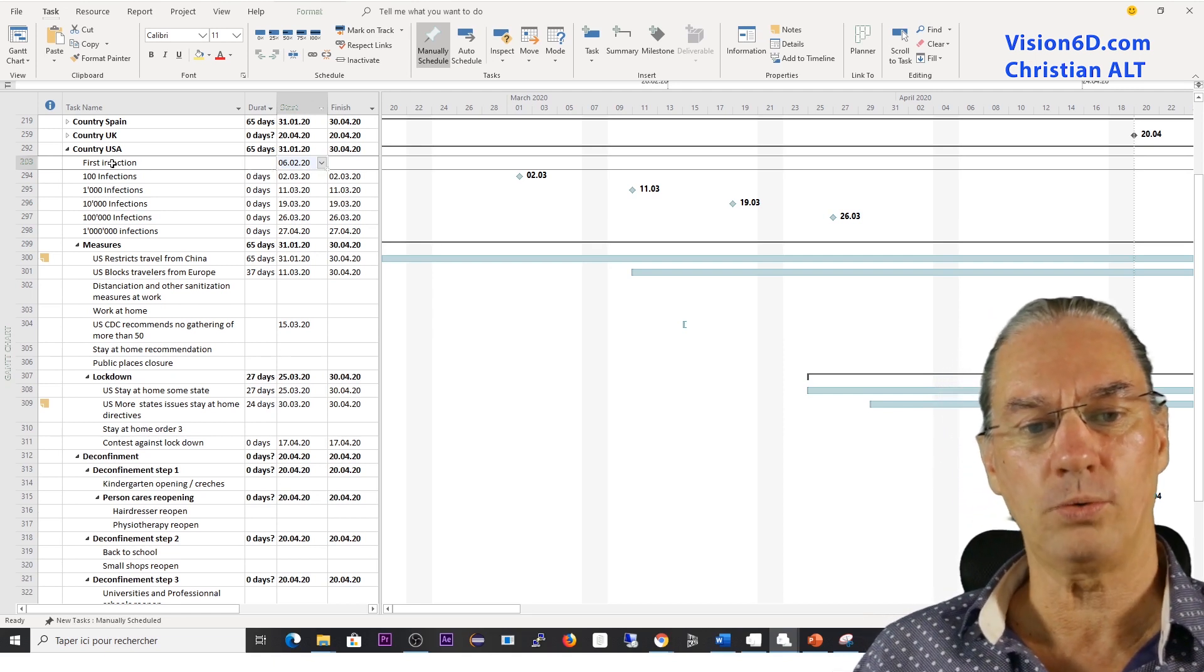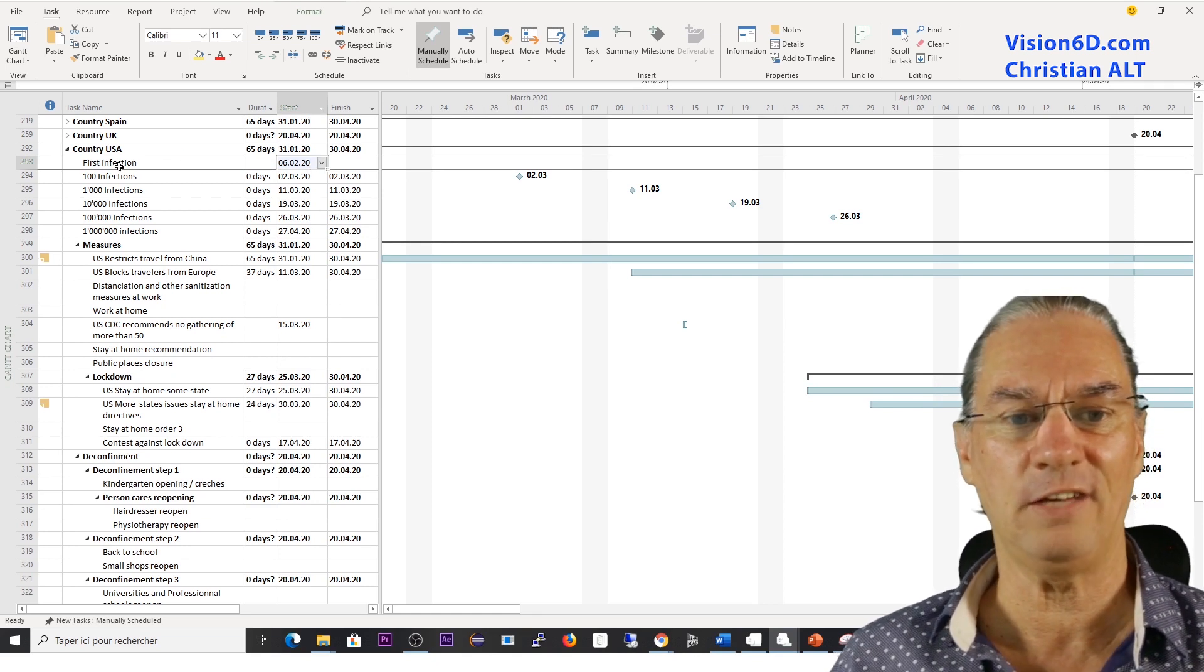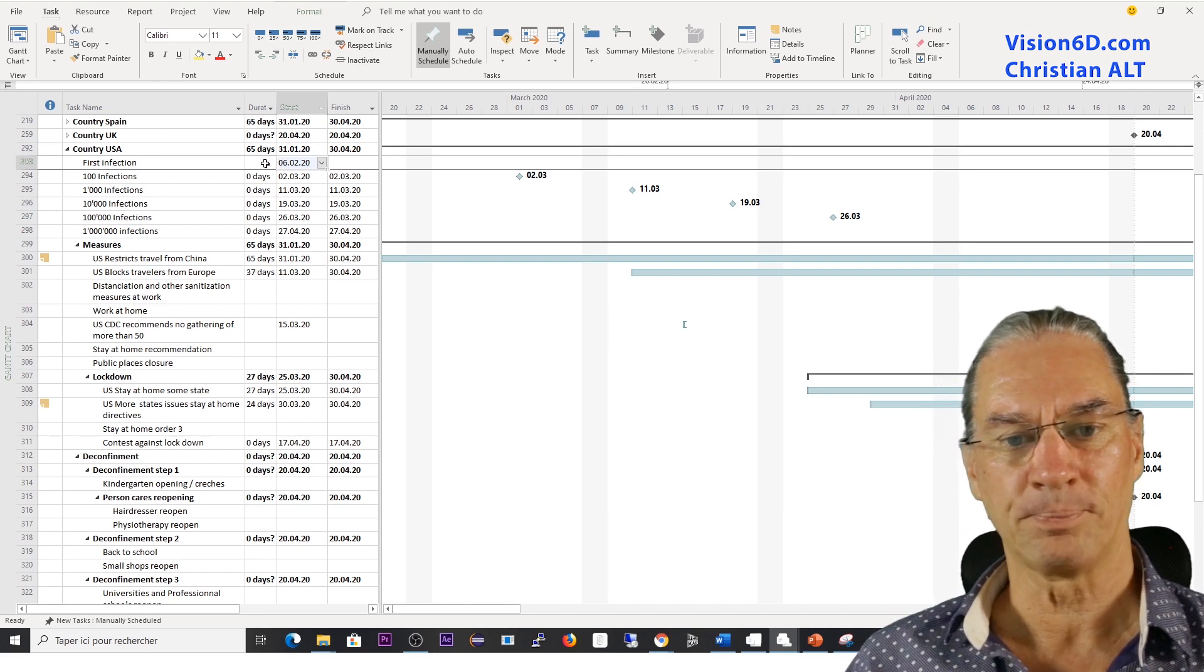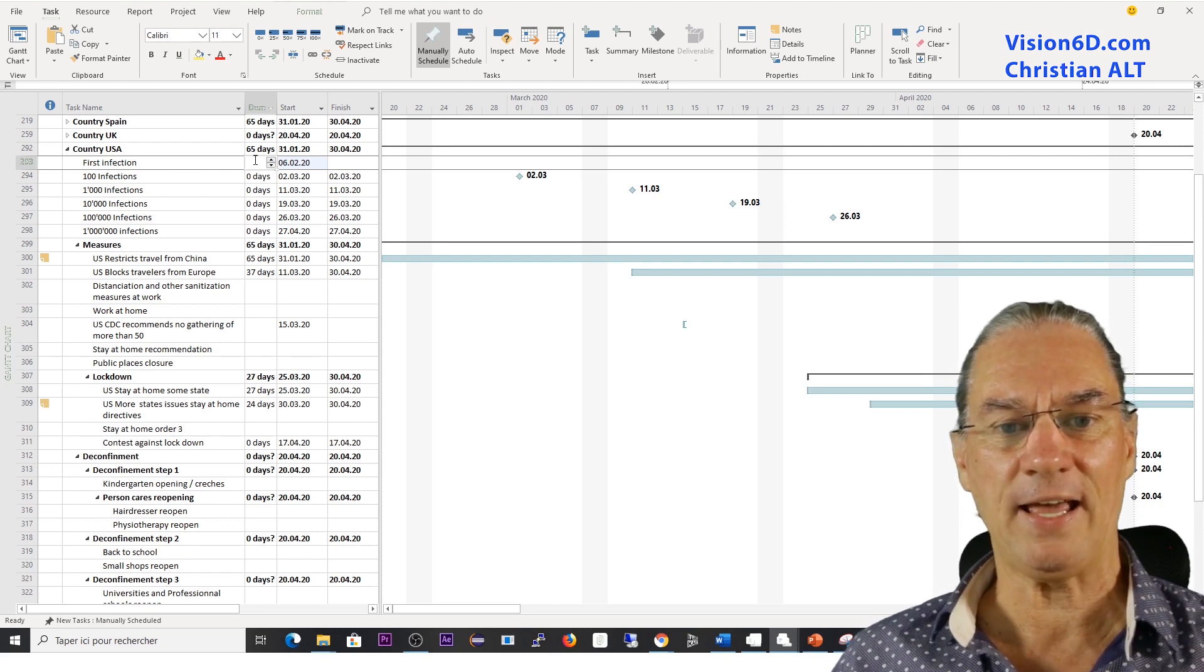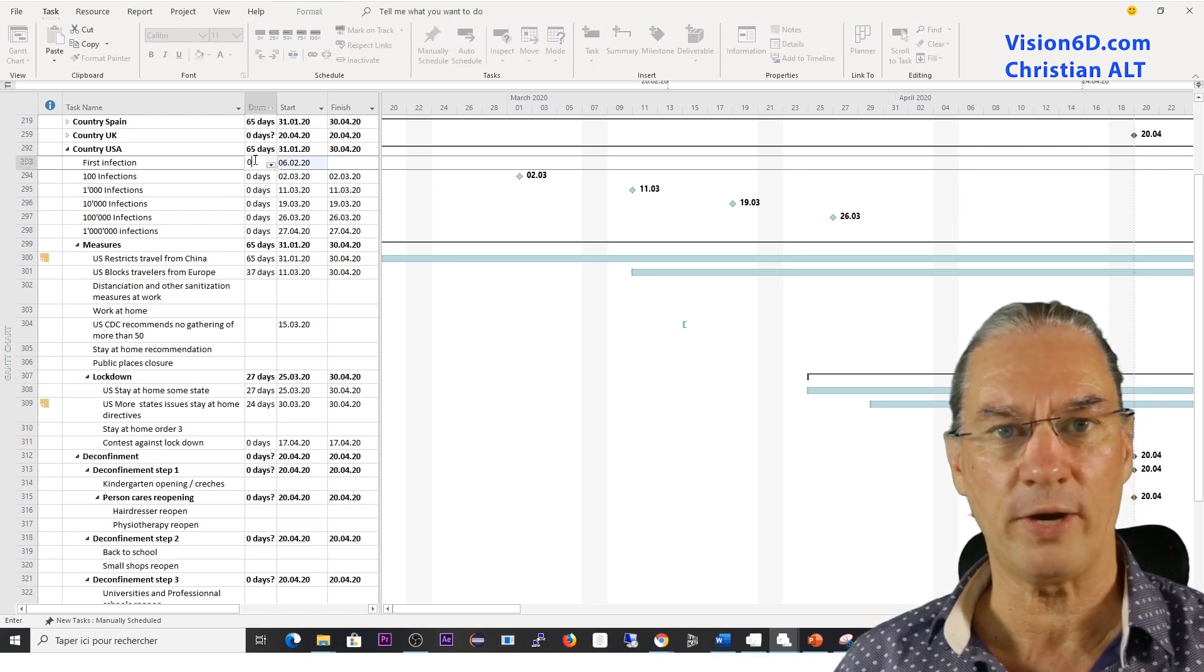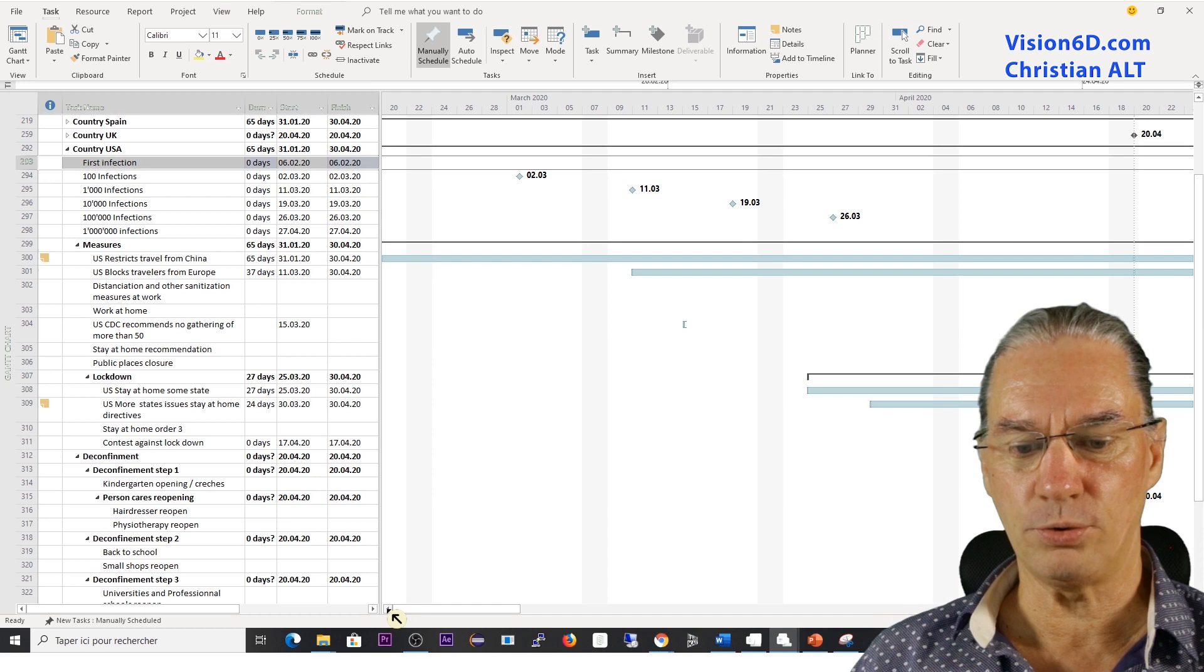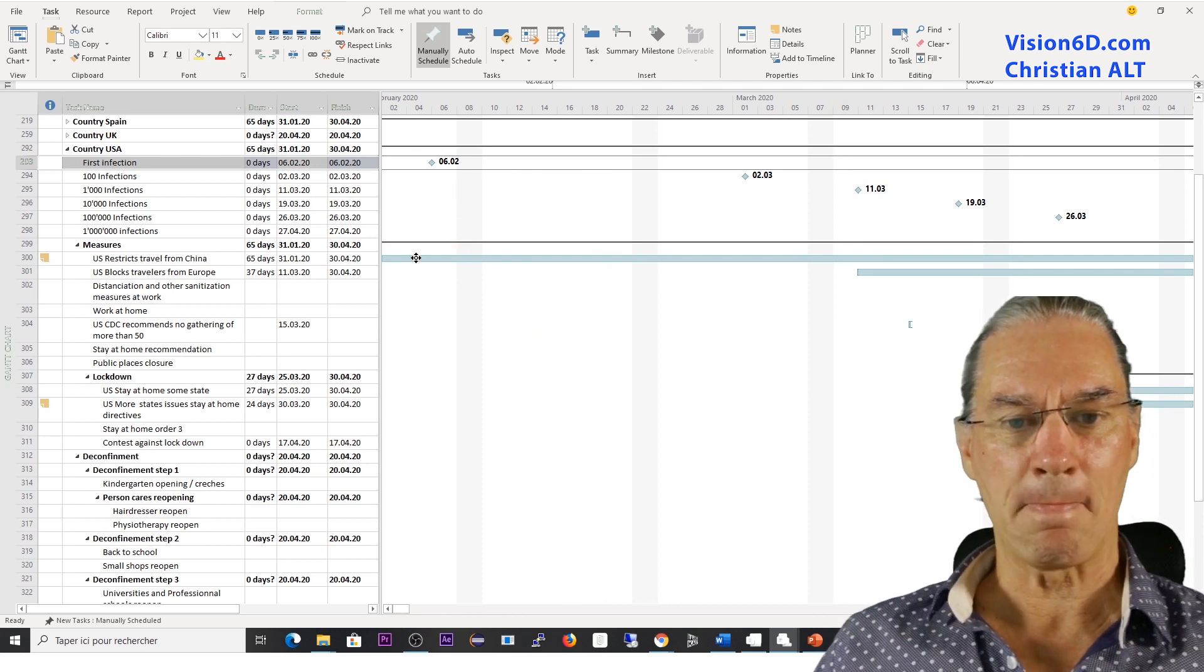So now, you see, I have a date here. I have a task or an event, if you are planning just events. And I want to mark this as a milestone. It's really easy to do this. A milestone is defined by a task that has a zero day or zero hour duration. So for this, I key in as duration, zero day. And you will see immediately, if I let you see on the Gantt chart, which is here, that date.